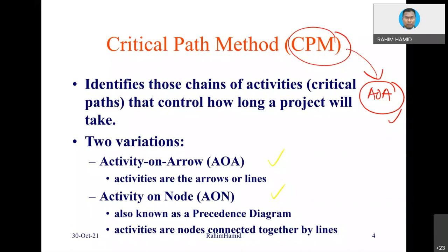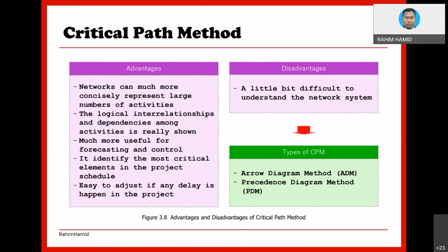Okay. So critical path is the calculation method, whereas the AOA diagram and AON diagram are the graphic representation of what we call a scheduling technique. Both will give the same result, because the calculation basically will end up being the same, except that the way the graphic represents it will be different, because that is how the methods were developed anyway, to differentiate between one graphic and another.